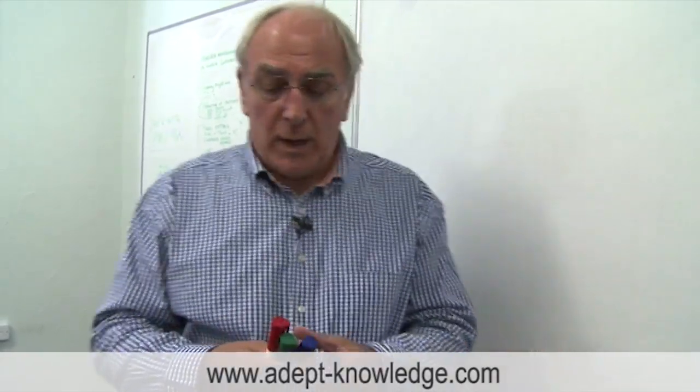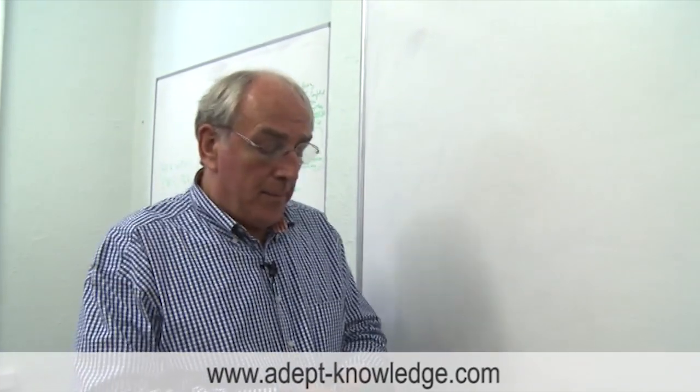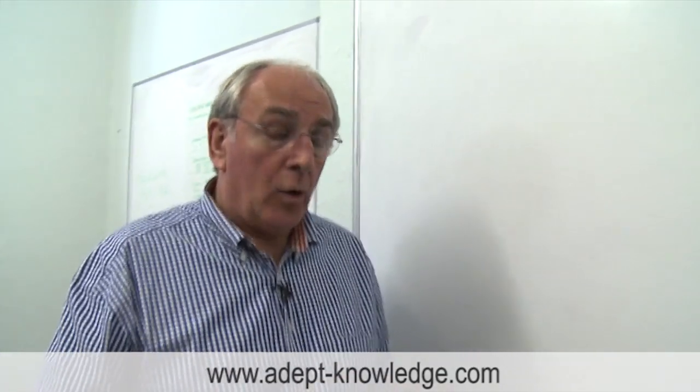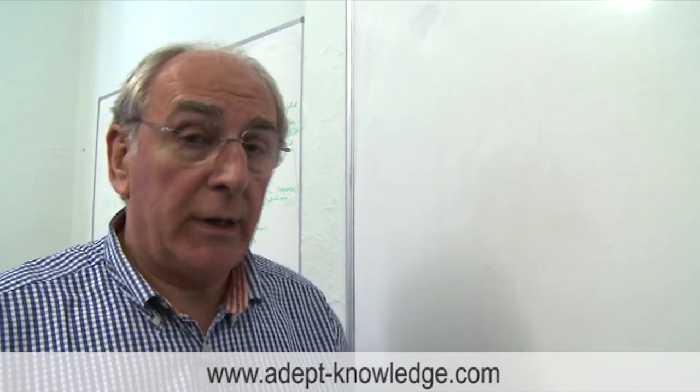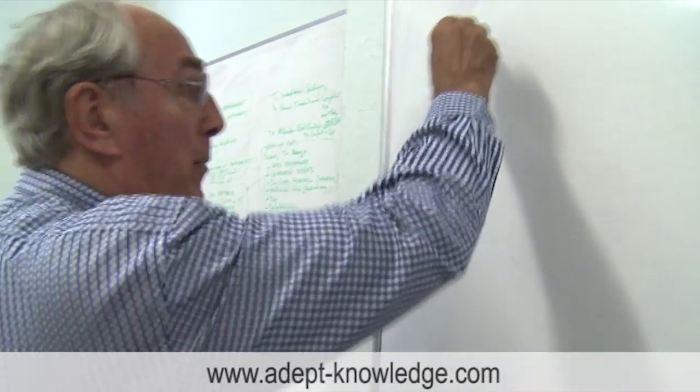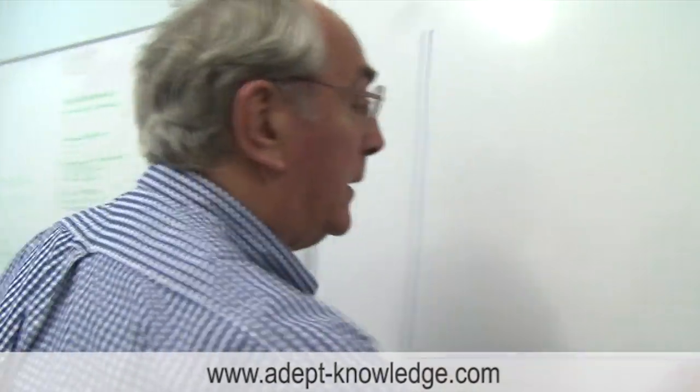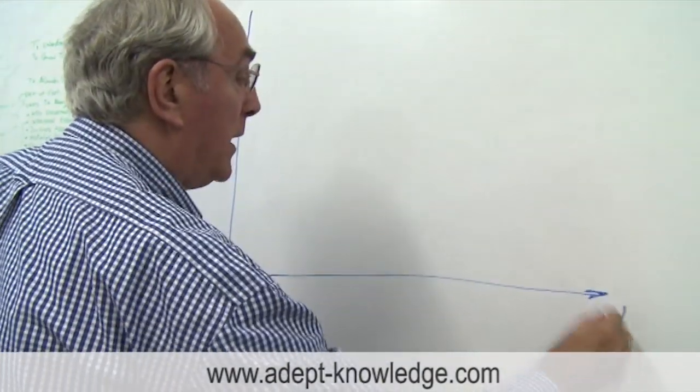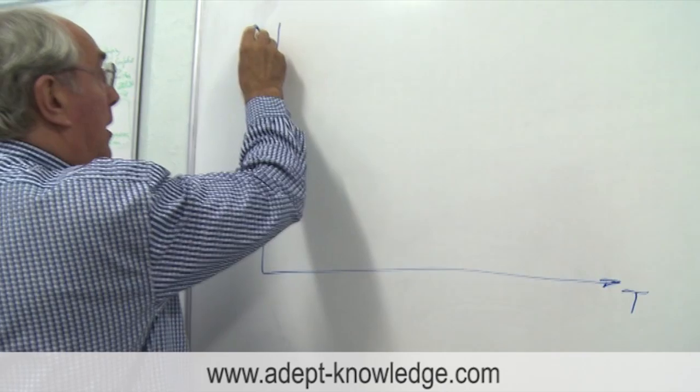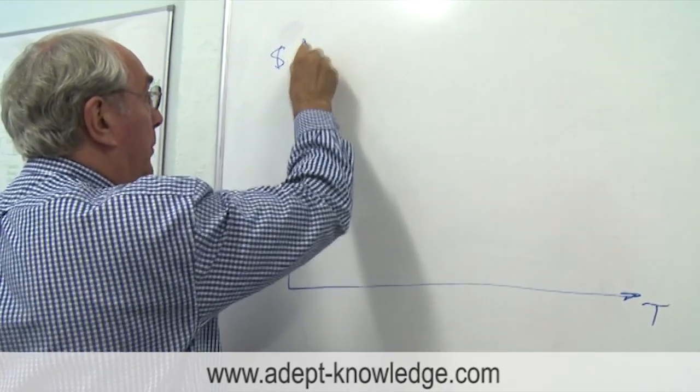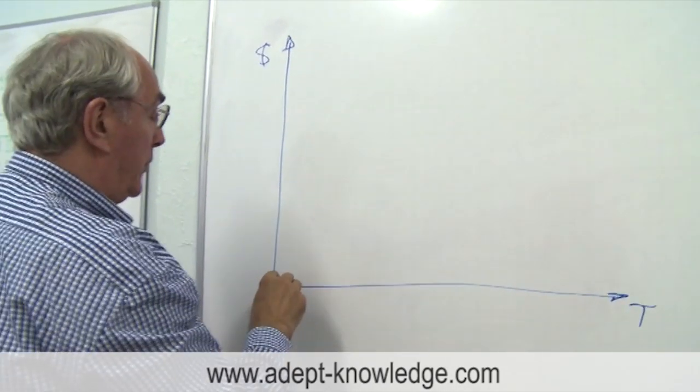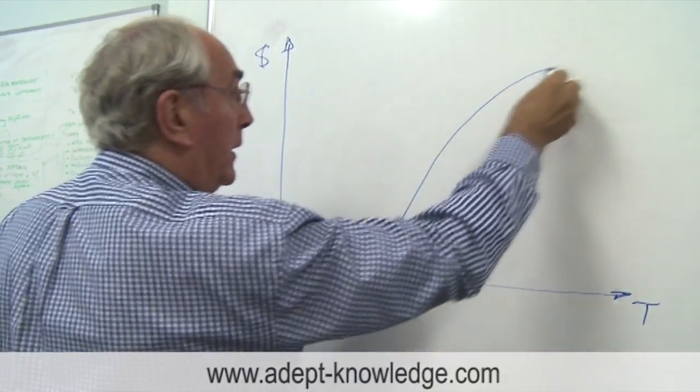So we start off by moving from all the resources or costs on a critical path network through to a bar chart as we've done before. And from the bar chart we've created a graph like this with time along there and either our costs, money or pounds up here or resources, we've developed our old friend the S curve.